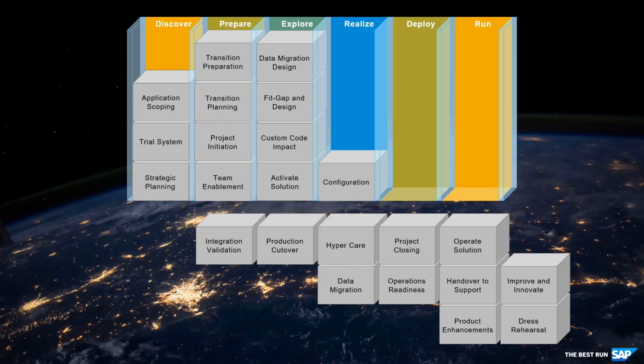The Delta design documents contain changes related to both the implementation of new functionality and the mandatory configuration adjustments. Configuration steps will be executed in different iterations, also called sprints, starting from general settings per line of business up to detailed configuration for each area.